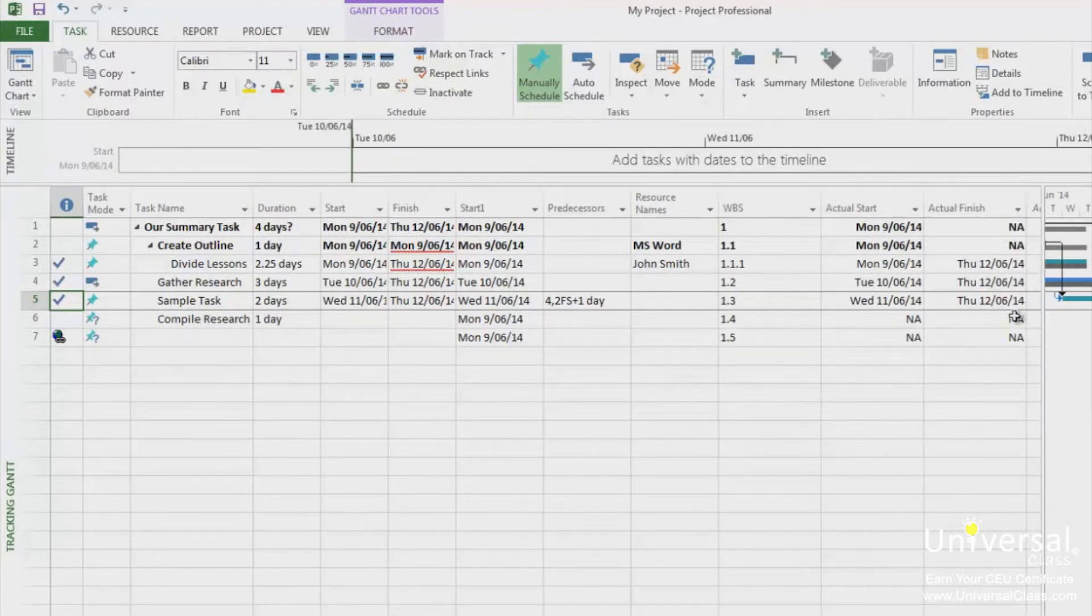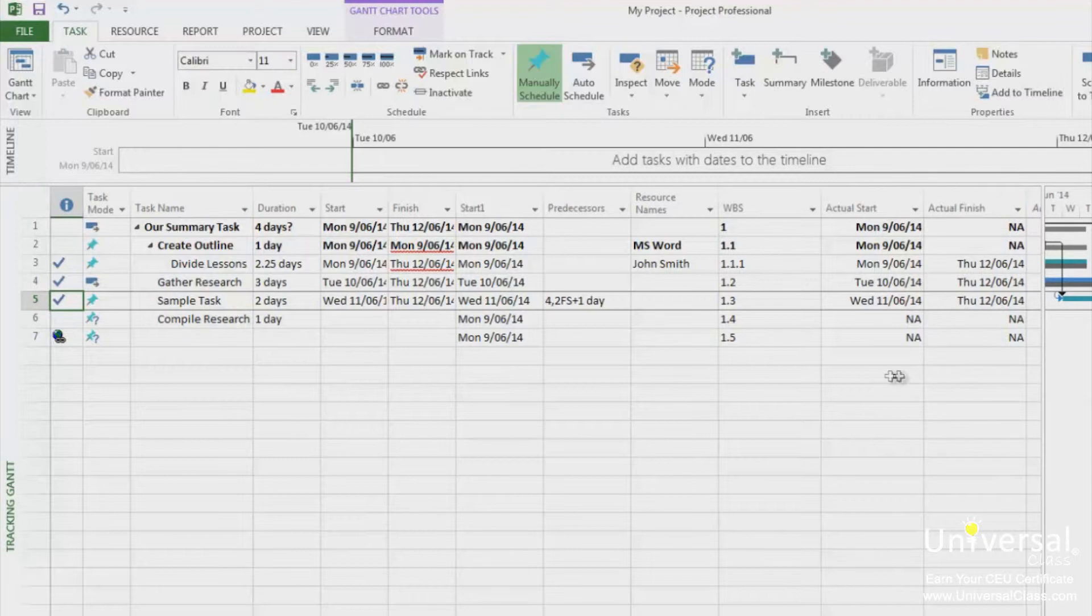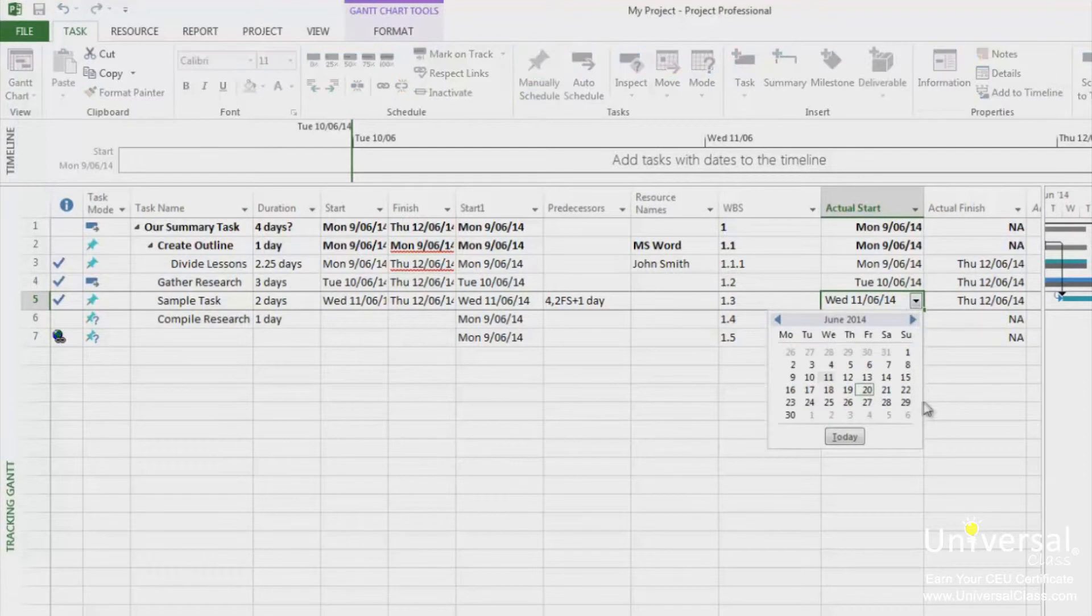In this Tracking Gantt view, you can see I have the Actual Start and Actual Finish columns. You can use the drop-down calendar in these fields for Actual Start or Actual Finish to specify a date.